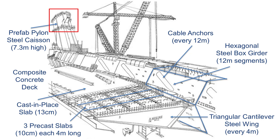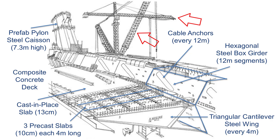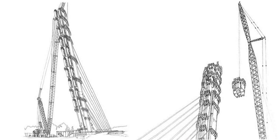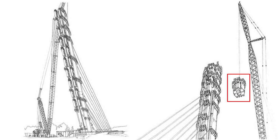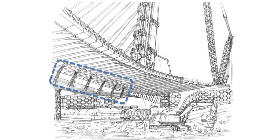Prefabricated steel caissons were used to construct the pylon, including an external walkway that enabled welding each steel caisson to the next. In the background are two cranes: the derrick was used for the pylon and the tower crane for the deck. Two views show the inclined pylon under construction. The left view shows the temporary elevator that ran on the back of the pylon and was later removed. The right view shows a steel caisson being lifted into place. The oval opening at the bottom is for the internal stairwell running the full height of the pylon, with the remainder filled with concrete. Another view shows the bottom of the deck near completion, with cables forming the cable stays hanging from the deck after the final tensioning operation.